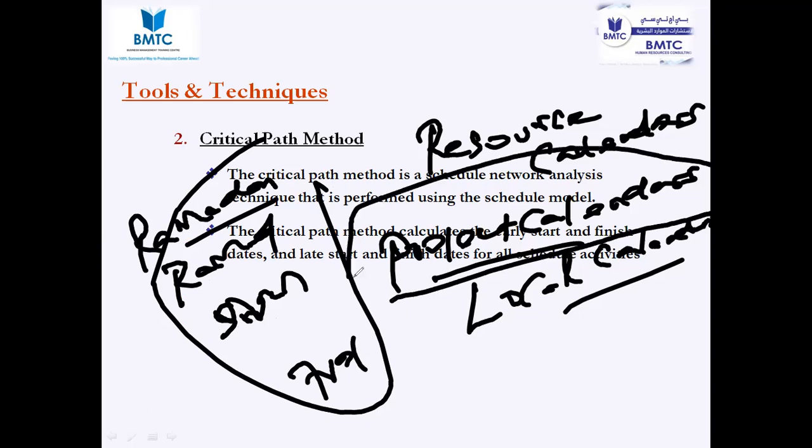So you are doing the work in Qatar, but your client is sitting in Europe. So make sure that you modify the project calendar. The local calendars will give you the information when you need to work and when you have to stop your work. Even though I got an order to work inside the mosque to refurbish it, on Friday at 11 o'clock I can't enter the mosque. I need to stop my work. Why? It's the local prayer time, so I can't do the work while people go inside.